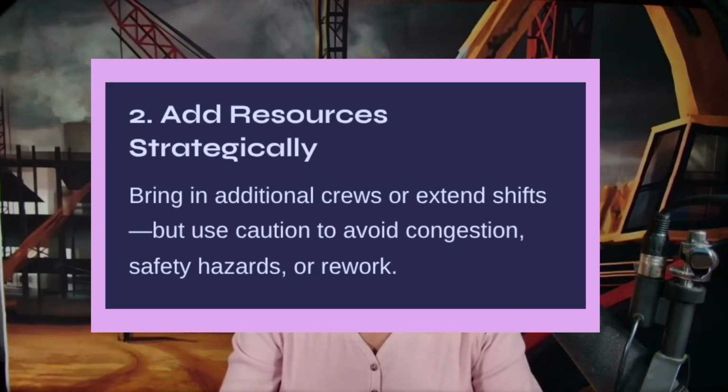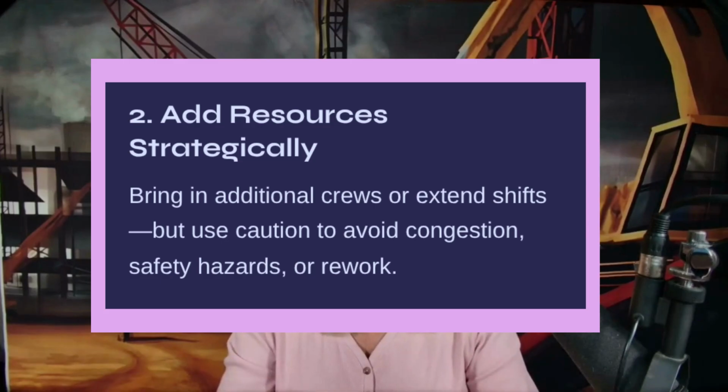Number 2, adding resources. Sometimes it's as simple as bringing in an additional crew or extending shifts. But use caution. Adding manpower without coordination can cause congestion, safety hazards, or even rework. Measure twice before you throw more bodies on it.